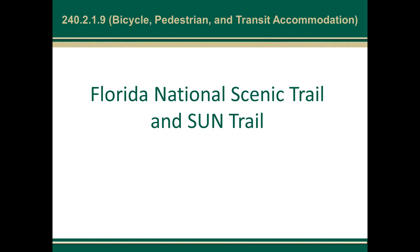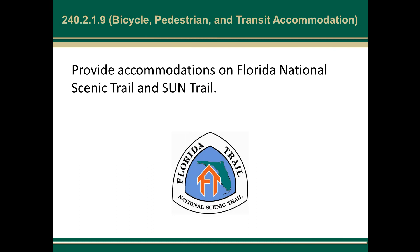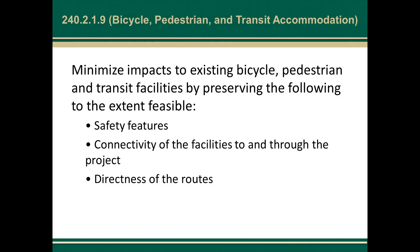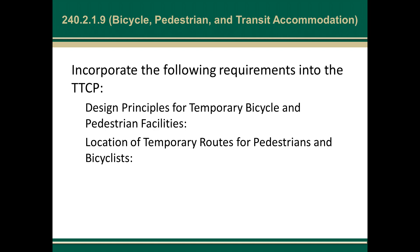We added new language to address the Florida National Scenic Trail and the SunTrail. The exact language says we're going to provide accommodations on Florida National Scenic Trails and SunTrails. We also went over an outline of basic principles: we're going to minimize impacts to existing bicycle, pedestrian, and transit facilities by preserving — to the extent feasible — safety features, connectivity of the facilities to and through the project, and directness of the routes. We will incorporate design principles for temporary bicycle and pedestrian facilities and the location of temporary routes into the temporary traffic control plan.